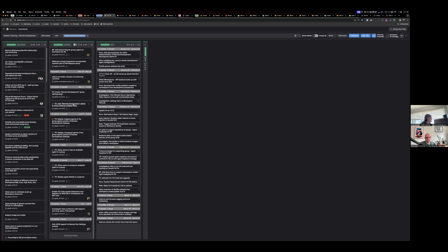And this allowed us, in the initial release, the beta release, and the GA release, to push back effectively and say, no, here is what the velocity says, and you're not giving us more people. Actually, you're taking them away for AI. Therefore, this is when it will get done. So your two choices are be okay with that or remove scope. And in both cases, it was remove scope.